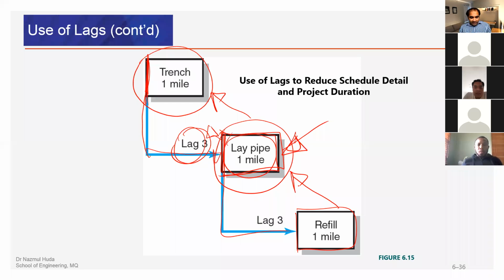So the piping team can start planning and preparation. They can't just sit idle, and they can't just wait until they have the approval for the trench, or until 1/3 of the trench is done, and then start. No, they should be updated as soon as the trenching process starts. When the engineers start on the trench, the piping team knows how much time they have. They have only 3 days to start the piping process. That means within 3 days, this is not waste. This is actually when the trench is being built.